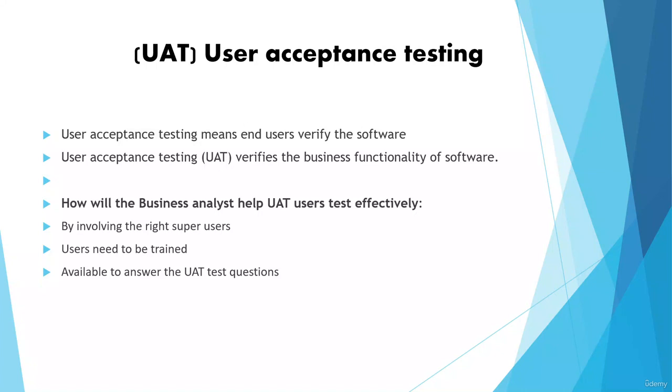Since the UAT environment is a clone of the production environment, when you have all the data uploaded, this provides the testers the ability to preview their future production platform. It provides a great opportunity to verify and validate and see how the system is working. So after completion of UAT, that is user acceptance testing, it will be time for the preparation for the deployment to the production.